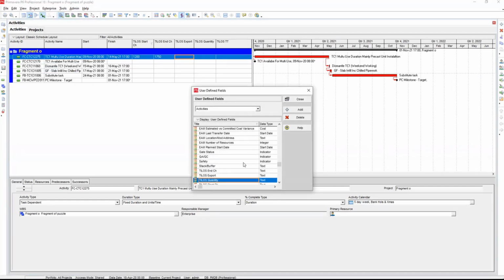So I would say it's a good thing, rather than everybody doing their own thing, to have some global setup that everybody just uses. And it could use the same, because you must do this for chainage as well. So you could use the same start and end distance value. I tend to use text because then if you get floats and decimal places and international commas and dots, you've got to really know what you're doing to get that.